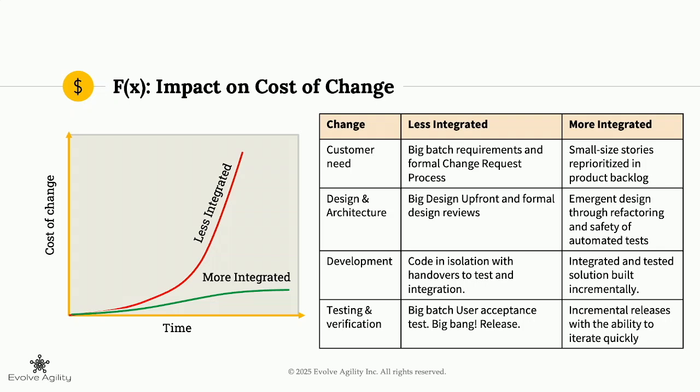So using a more integrated approach, I can reduce the cost of architectural change, the cost of development, and the cost of testing simply by doing one trick, which is reducing the size of the requirement, which is essentially a smaller and smaller and tinier project with a stable group of people working on these requirements all the time, as opposed to fractional allocation of individuals to large projects.